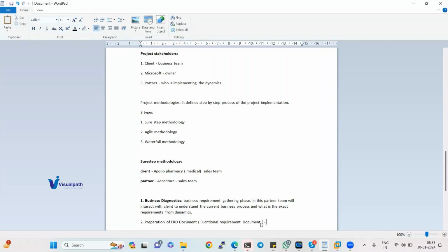But there is a second project. After I left that project, I joined another project. In that project, the client is very good. She is very good and she will come for a call any time. She will respond to the emails properly. She will give the requirements on time, and she will come for testing also in the call sometimes. So that project finished within 6 months only. Why? Because the client is so interactive and the client is giving so much help to us. So these are the two scenarios.